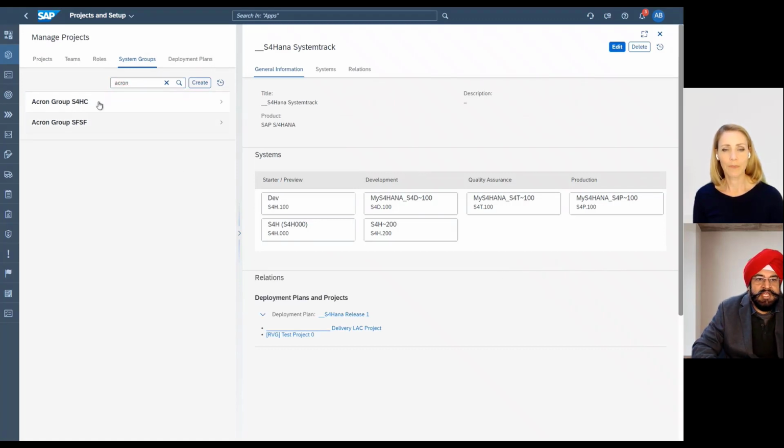So as I explained, I have two system groups, one for SAP S/4HANA Cloud, one for SuccessFactors. Both can have their own description and individual set of tenants that they are going to use. So far, they are completely separate. But you want to manage them together with a common release schedule. And here I can make a guess that maybe you want to have common end-to-end integration testing for payroll processing, and you want both teams to be ready at the same time. Is that the right direction?